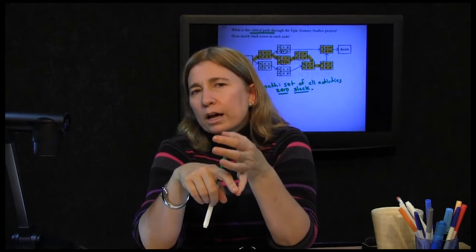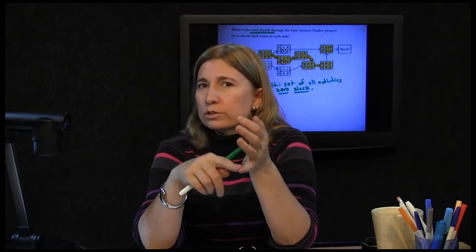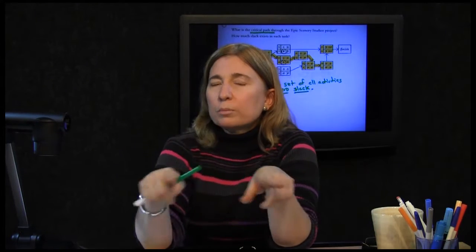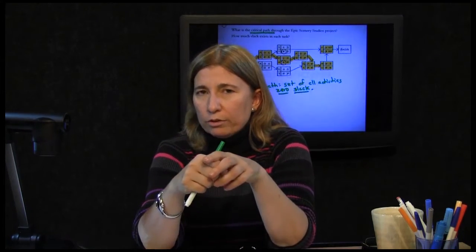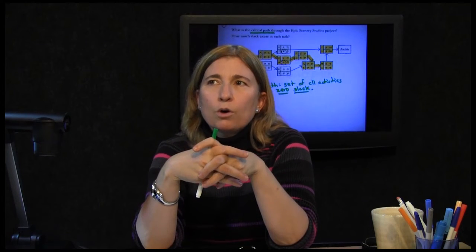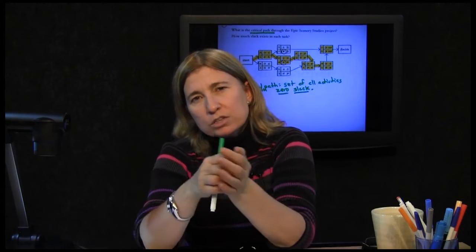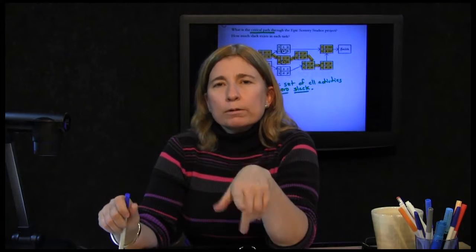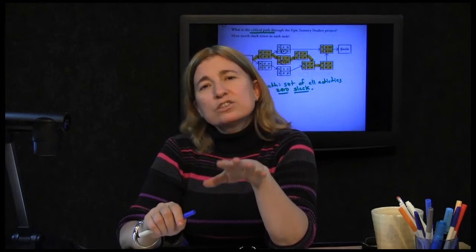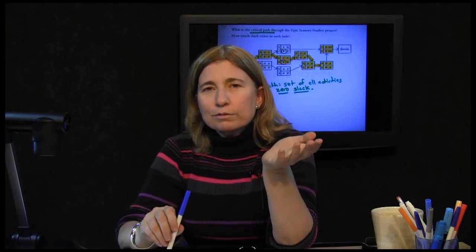It is also a couple other things that you might want to note. The critical path is the longest path through the network. The critical path is also the reason that the project is 10 days long, because we found out in earlier analysis that this project from Epic Scenic Studios will be 10 days to finish. Loosely speaking, the critical path is the reason it will be 10 days long. We still haven't identified what it is.